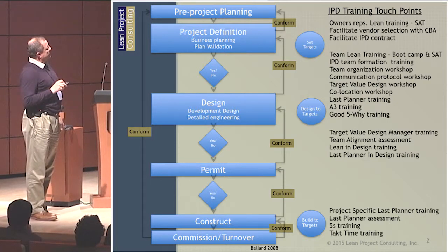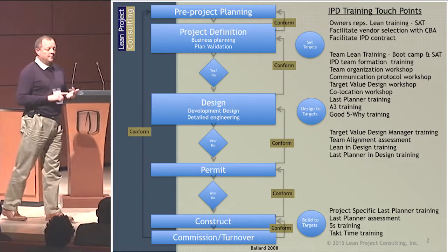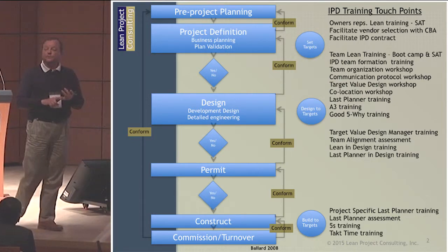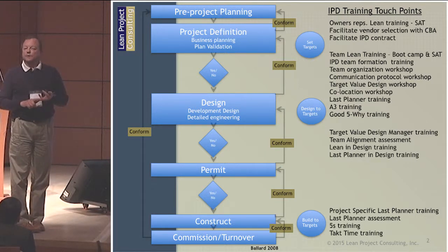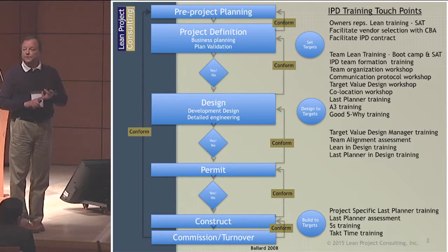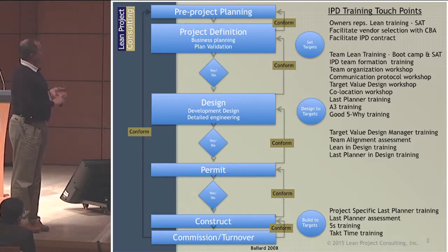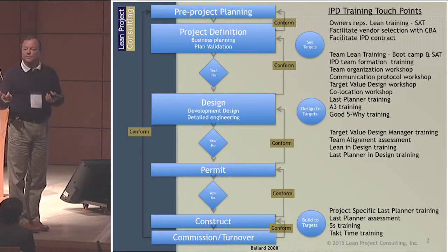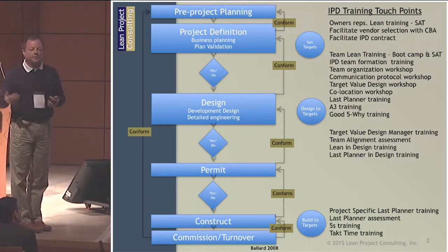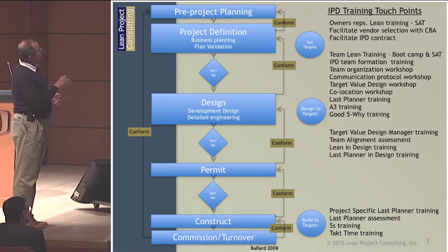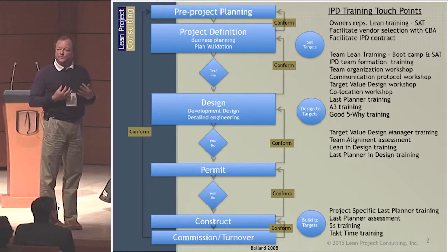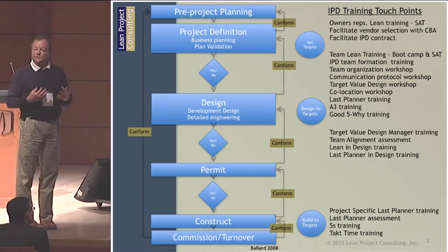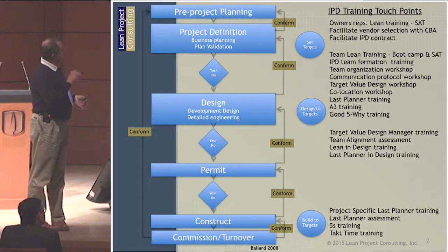The owner decides that if we build this project, that does these things, for this cost, it makes good business sense. The team validates that information and answers the question: can we build the project for this price, that does these things, with this certain quality? The answer is either yes, no, or yes if — yes if certain innovation is true, yes if the market rate for copper doesn't go up. That information is then conformed back to the boards of directors and corporate managers at a go/no-go gate.